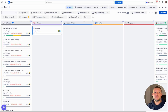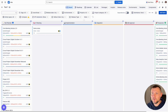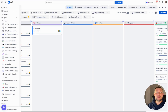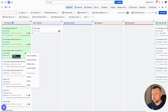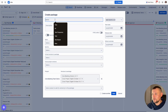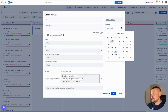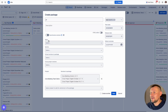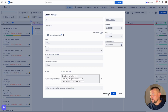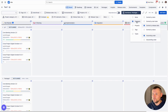If we need to track complex releases consisting of multiple granular releases, this is the right time to set up packages. To create a package, we can select multiple releases on the board and create a package from them. We can specify a name, start date, release date, and rollout end date if needed. Each package can contain epics, sprints, virtual versions, cross-project versions, and projects. As soon as we create it, we can start seeing packages as swimlanes on our Kanban board.